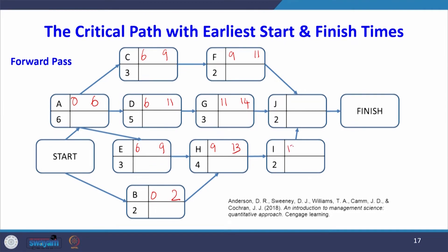Then 13 + 2 = 15. For activity J, there are three ways — from F, G, and I — the largest is 15, so 15 + 2 = 17. For this project, the total time taken to complete all activities is 17 weeks. The top values represent earliest starting time and the bottom values represent earliest finishing time.